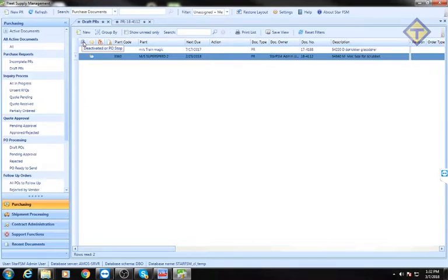And if that's a deactivated vendor or PO stop, okay? Because sometimes if you have a contract model, the PRs can go directly to the purchase order if that's part of a contract and the amount matches the amount we have in the contract.